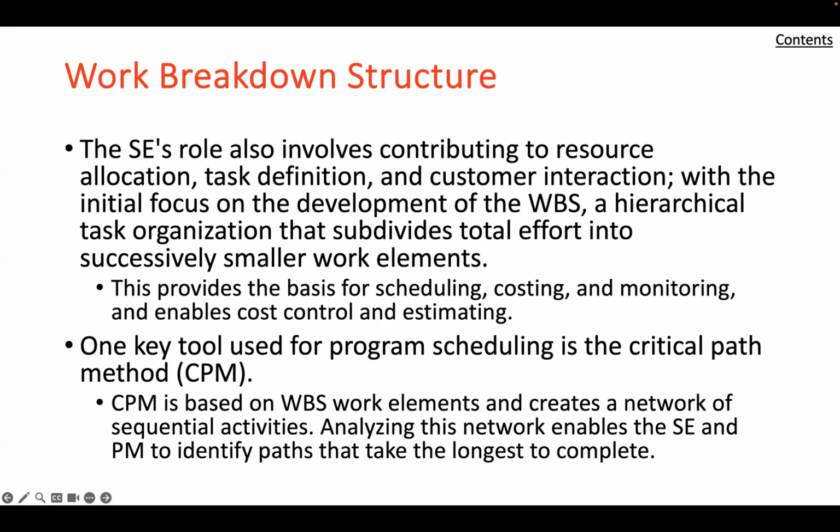The WBS is often a contractual requirement in competitive system developments. The WBS typically defines the whole system to be developed, products developed, produced, tested, deployed, and supported, including hardware, software, services, and data. It defines a skeleton or framework on which the project is to be implemented.